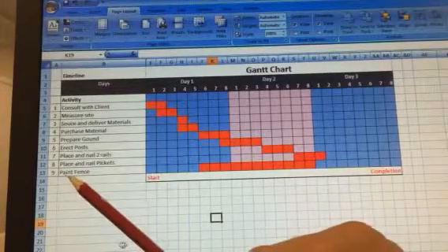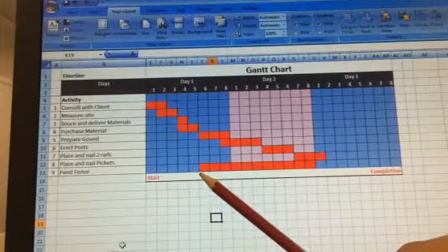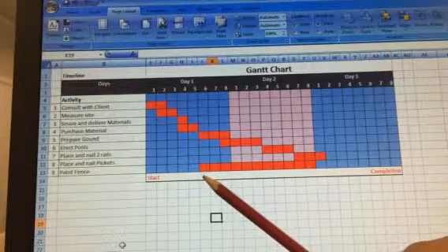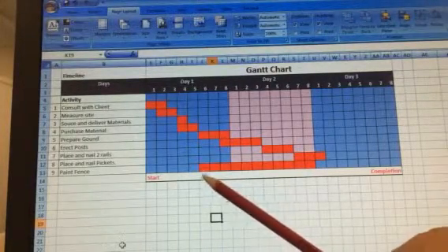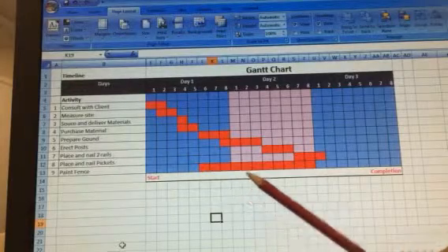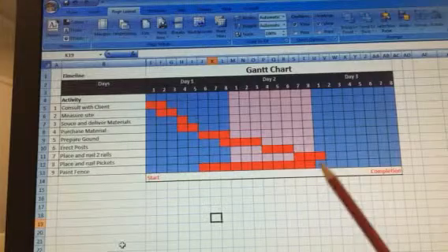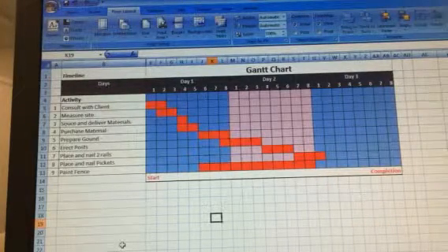However, if we look at the last item, number 9, paint the fence. If you've ever built a fence and painted a fence, you'll understand the benefit of painting it prior to it going up. So if you're in that trade, you would endeavour to paint the fence while doing these other tasks, and subsequently get the job done before the 3-day requirement from the client.